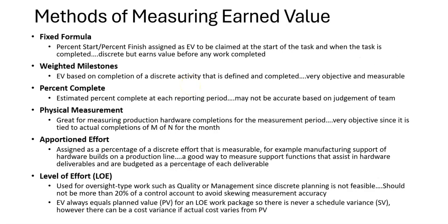Okay, so the methods of measuring earned value. First, there is a fixed formula method, and that would be a percent start, percent finish assigned to a particular task. I don't particularly like this because you're getting earned value on day one before you've done anything on that task. And then you're getting the rest of the earned value at the very end when you complete it. So you're not measuring in between.